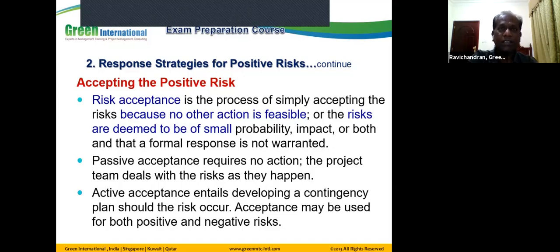So we came up with a contingency plan. In case the district cooling plant supplier is not able to supply chilled water when we complete the project, what could be done? We planned to operate the towers with a temporary chiller for at least 6 months. When we hand over to the tenants, they will do their own interior fit out, which may take 6 months, and by then the occupancy rate will be only around 30%. So why not operate the tower with a temporary chiller?